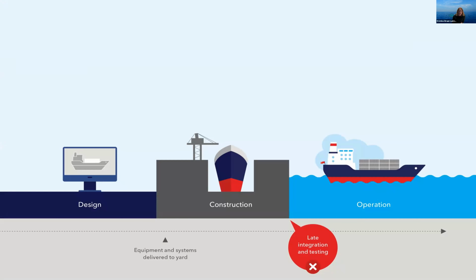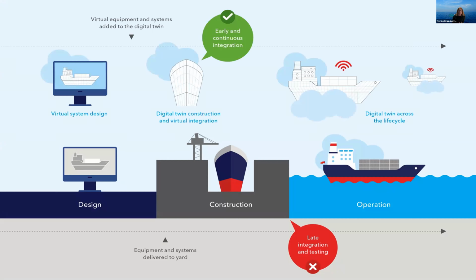So, with the open simulation platform, we are trying to enable the industry to shift left, or what we mean by that is to move the commissioning and integration to earlier in the timeline through establishing simulation models of equipment and systems early in the design phase. So what we then do is to facilitate virtual system integration, commissioning and testing before the physical vessel is built. And through this, we mean you can save time and reduce the risk both during commissioning and during sea trials.